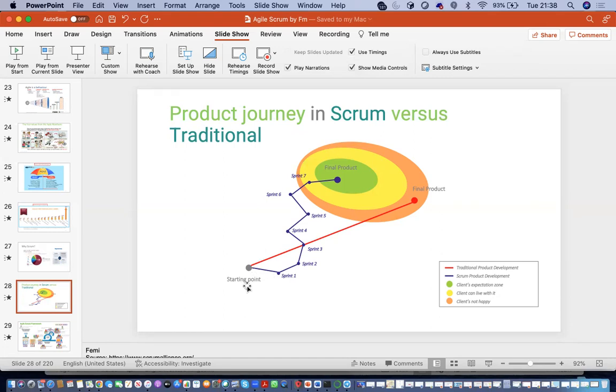And the team would also need to inspect and adapt through a ceremony that we call retrospective. No, review. We have the review, but we also have the retro. Review is where the business would come to be able to give you. Then you present what you have, and they are able to give you feedback. But retrospective is for the team to be able to look back at what has happened over the 2 weeks and see how they can get better. Yeah. Does that make sense?